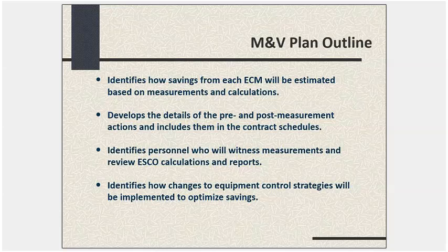And this is one of the areas where, technically, I would say if there's an area that's probably the most significant for most ESCOs in terms of risk, performance risk, controls are a big place where performance risk can come in. But risk also is opportunity. It's the same area where the big opportunities for optimizing and improving savings above the guarantee level also exist, because it's where there's technically a lot of variability. And so, yes, controls are really important because they can hurt you, but they can also help you a lot and help you exceed your performance.